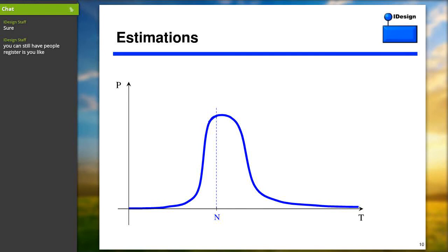And the answer wouldn't change if I say, what if I give you a lot more time than a day, maybe a week? The answer is still zero. What about a month? Zero. If you give a month for a year's project, regardless of how much energy is spent, the probability of success is zero. So with sufficiently aggressive deadlines, probability of success is zero. What about 6 months? Well, maybe 3%. Maybe a miracle is going to happen.